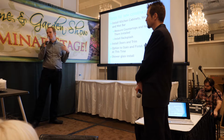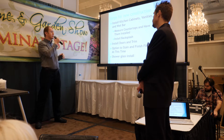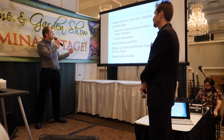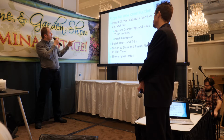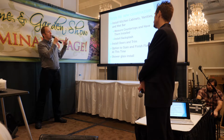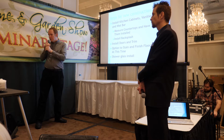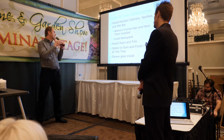And then at that point, you can have your tile guy come back and install the tile, backsplash, wherever you're going to put that. You also want to go ahead and do your doors and trim. So you want to do your cabinets, vanities, and all that first, your doors second, and then the trim will be last, because all that's dependent on where your cabinets go and the trim stops. You can't put the trim in until then.